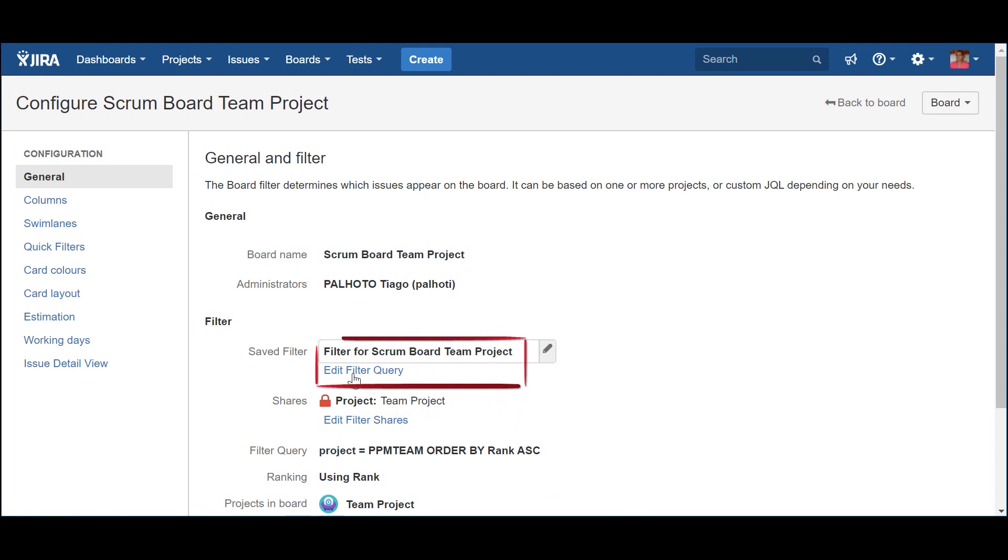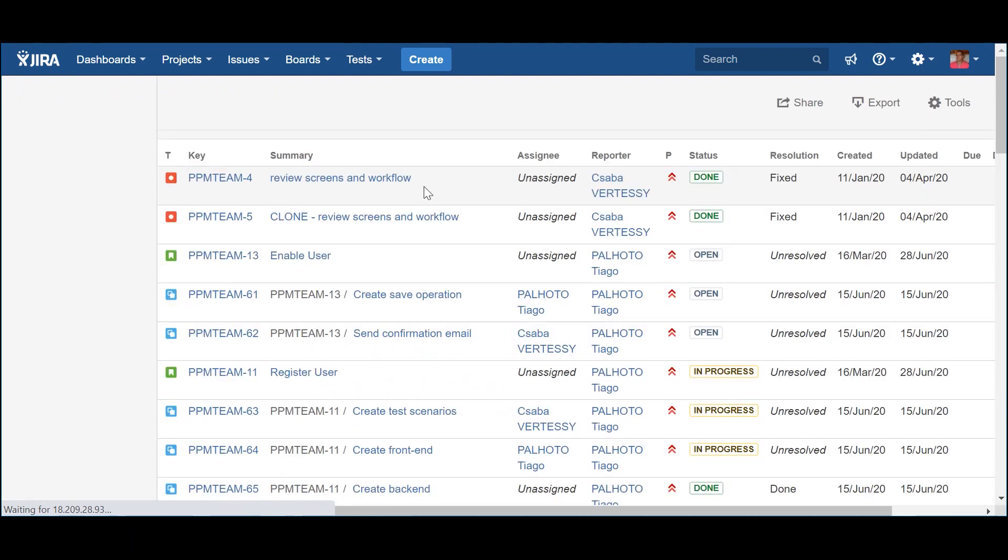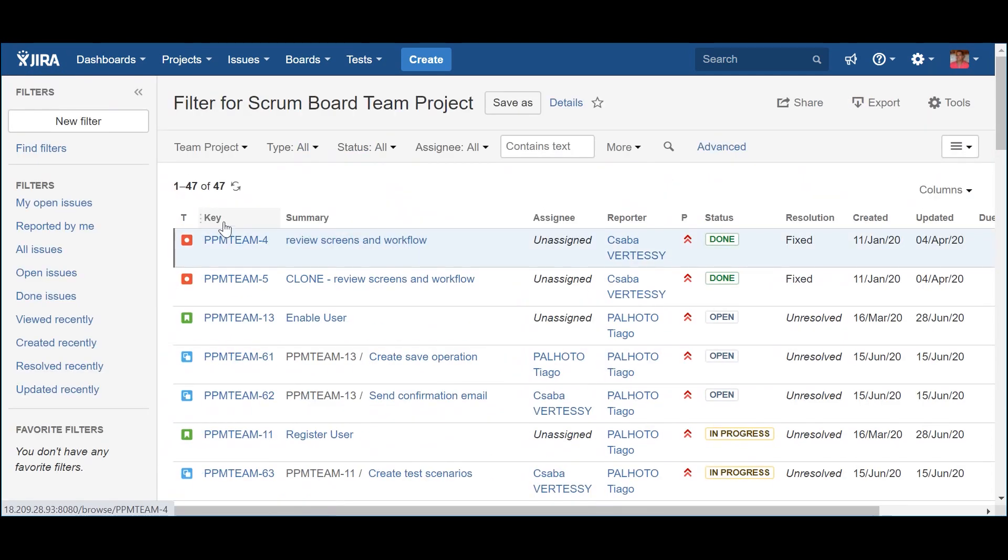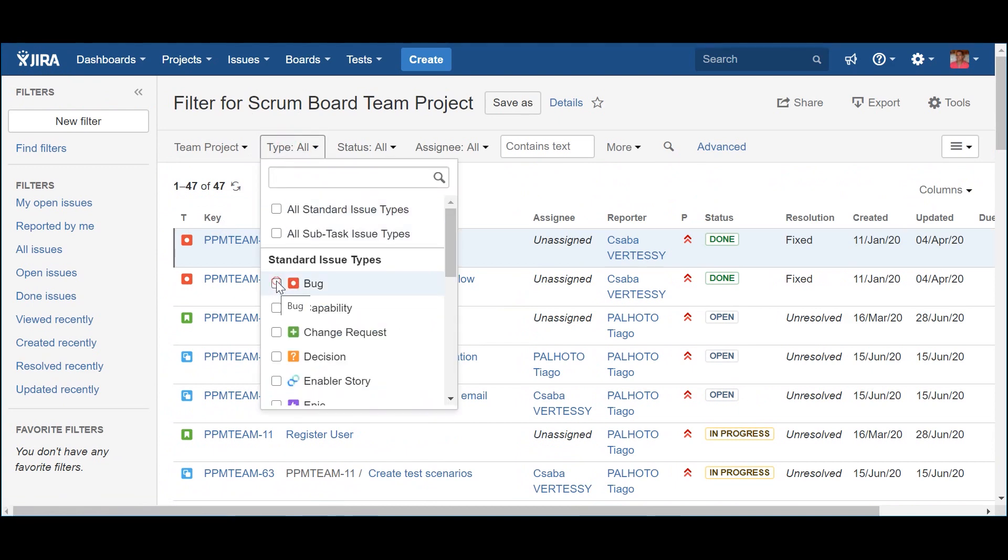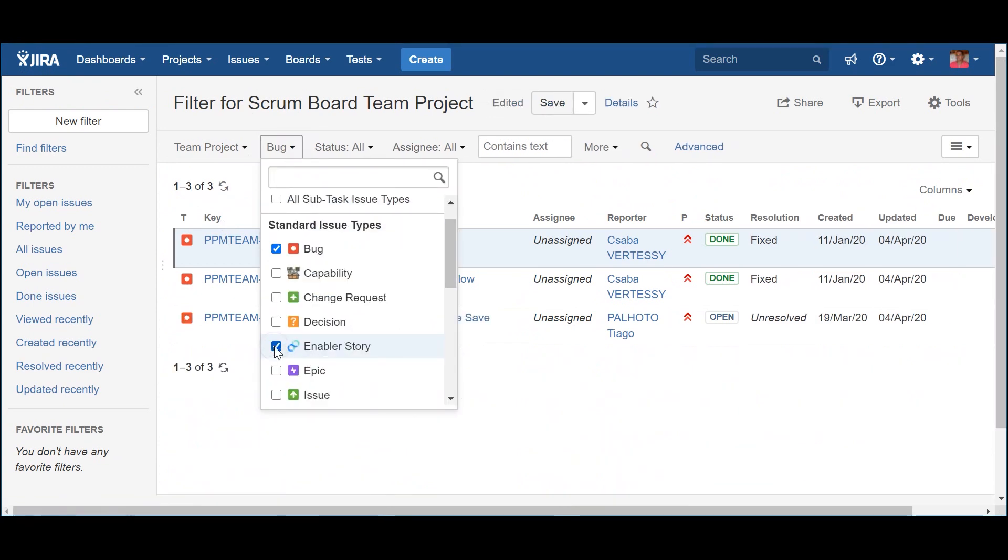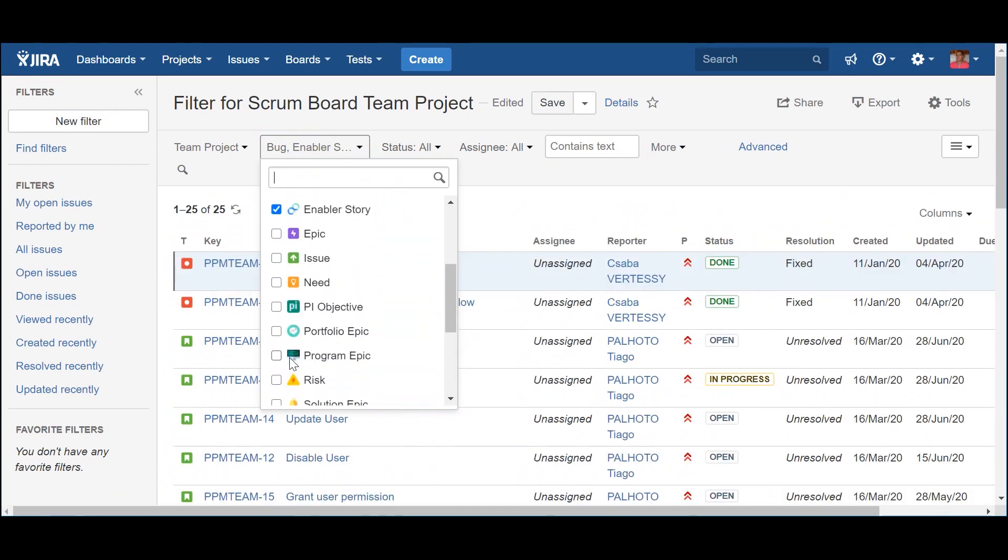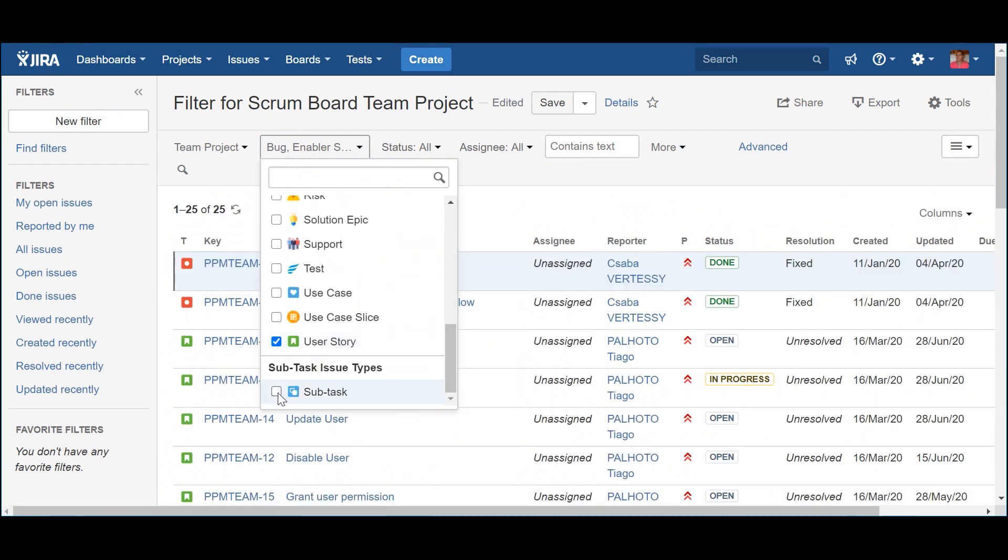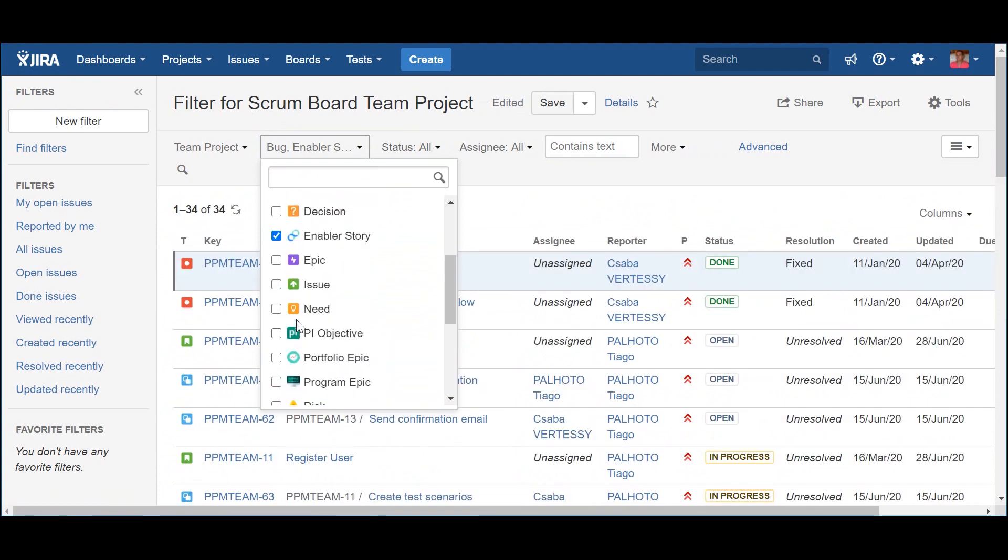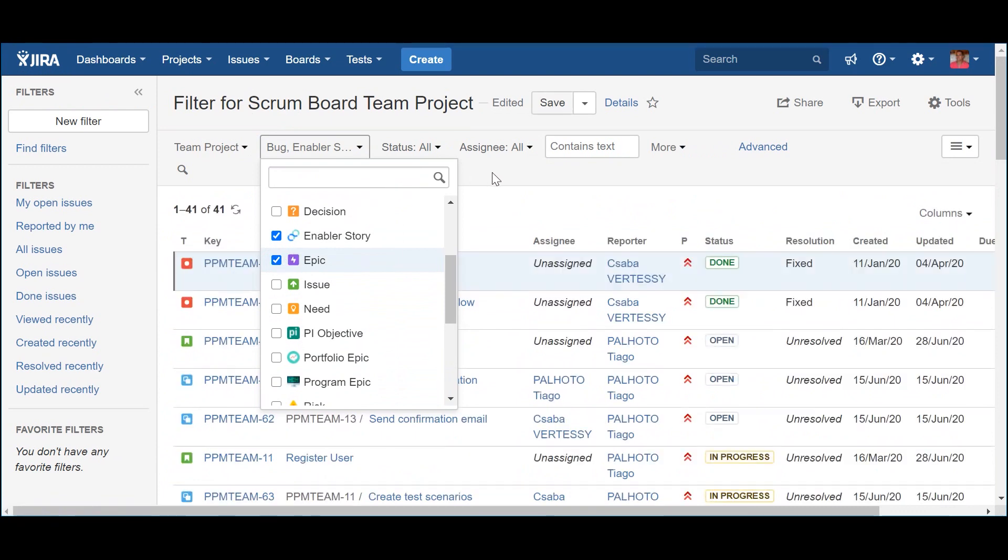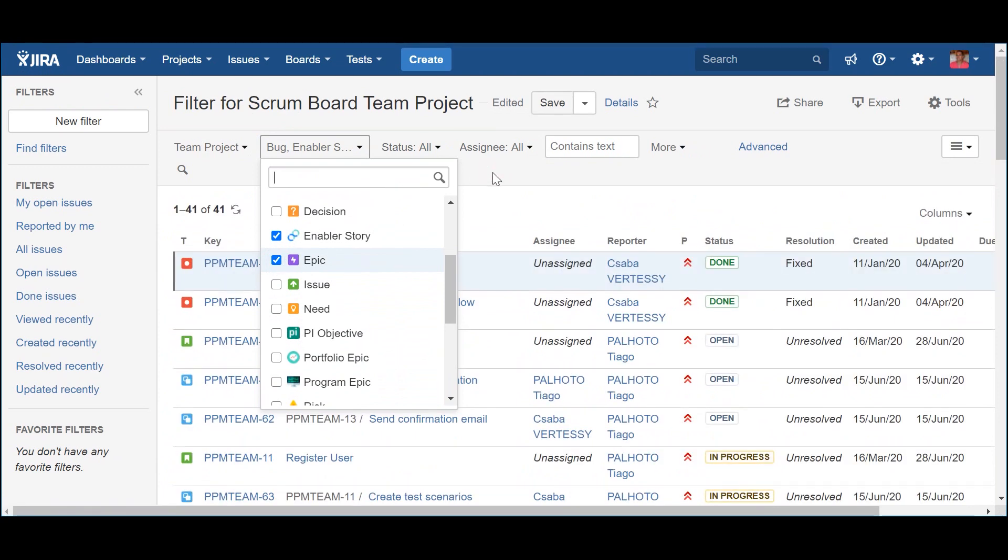After creating the scrum board based on the specific project area that you plan to manage, JIRA will automatically create a filter. This is where I draw the first point of attention. The types of items to be included in the board should be added to the filter configuration. As part of the backlog items, we have the story, enabler story and bugs, which will be placed in the upper streamline. As for the atomic units of work, we have the subtasks, which represent the tasks to be completed to deliver each backlog item. Those will be visible in the lower streamline. Finally, there are the epics that will represent the functionality and more that will be implemented via the stories. These will be only visible as part of the backlog section of the board.